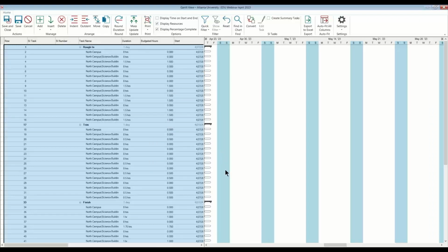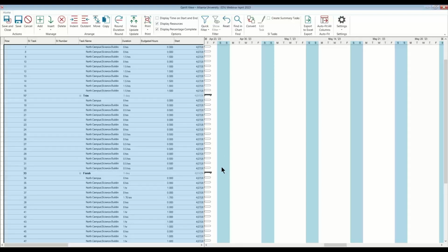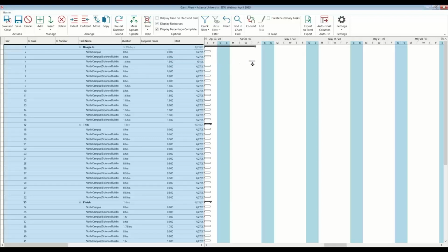So I can actually see what each phase of the job looks like, as well as how much time we should plan for each phase of this. And these are all basically buckets of time that we can now take, and we can now lay these out and put these on the schedule here where we want them to go. And at some point, we can also start assigning this to specific team members on staff or to subcontractors, and that will send out a task to that technician or that person out on site, and they can actually run through that list, check off the items, view the drawings, document field changes, all that stuff's coming right back to the system. So you can do it all here very quickly in the platform.